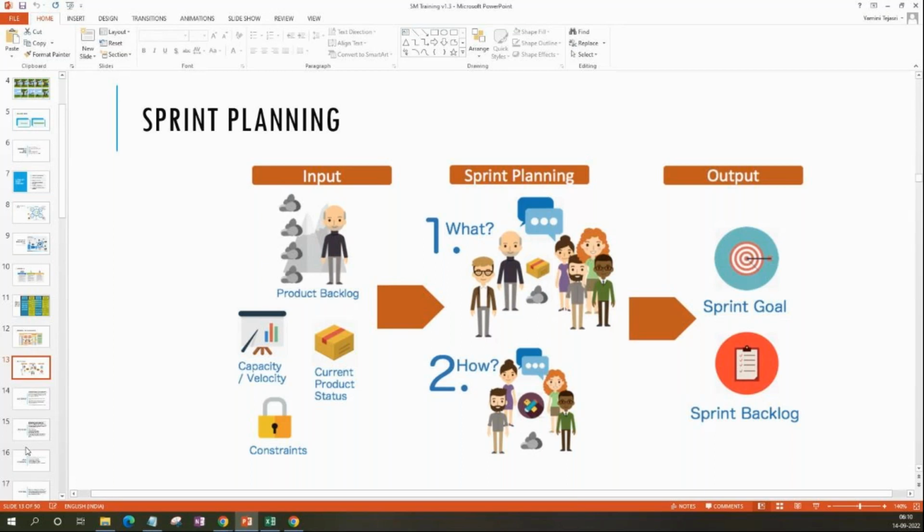So we just need to ask the customer whatever requirements they have, because after that it's not going to change. We need to ask everything before, right? Correct. Requirements can change, but in the longer run, not within these 2 weeks. So you will be replanning, redoing your product backlog based on the changes that come. So they can give their additional requirements after 2 weeks and we can use that? Yes, definitely possible. Any other questions?